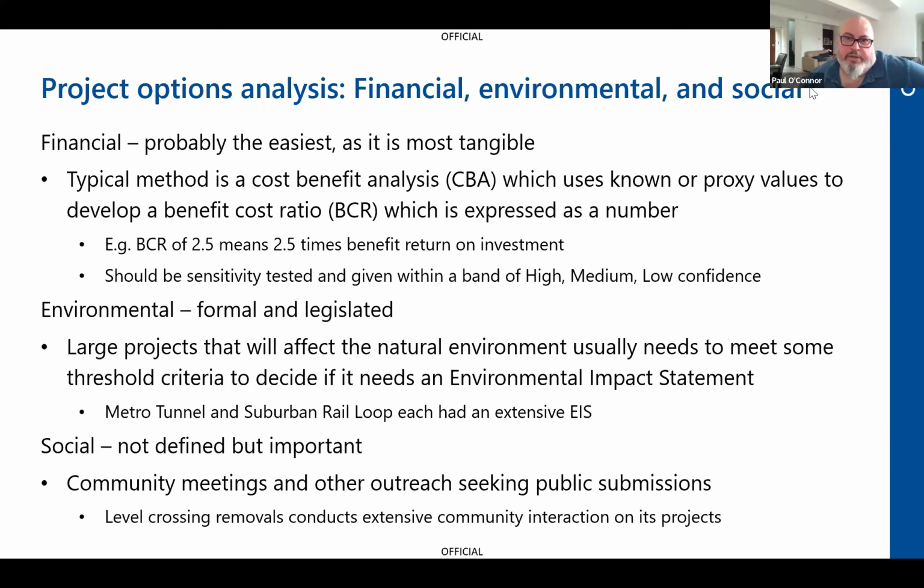But they had to be aware of that issue, and they had to put a lot of controls in during both construction and planning to try to intercept it if they could, and then put in place particular treatments otherwise. So that gives you an example of one particular problem, which was a historical problem and actually was not the state's fault that that contamination existed. But the state, because it was building that facility, had to put in measures to stop that contamination from coming into the site.